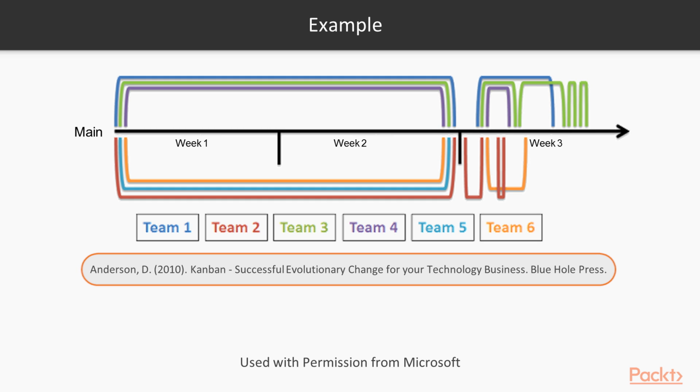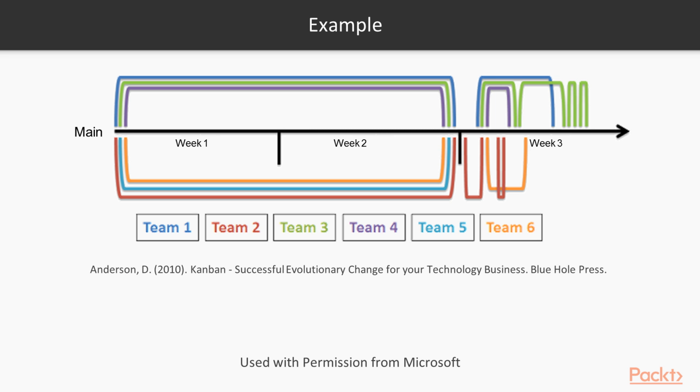Typically, most organizations will be based on this 2-week sprint. And then what I'm seeing in some organizations is to use week 3 as an integration week with all the other teams. So therefore, in this simple example where 6 teams are working simultaneously in some kind of scrums, as you can see, different teams are working on different items in week 3.